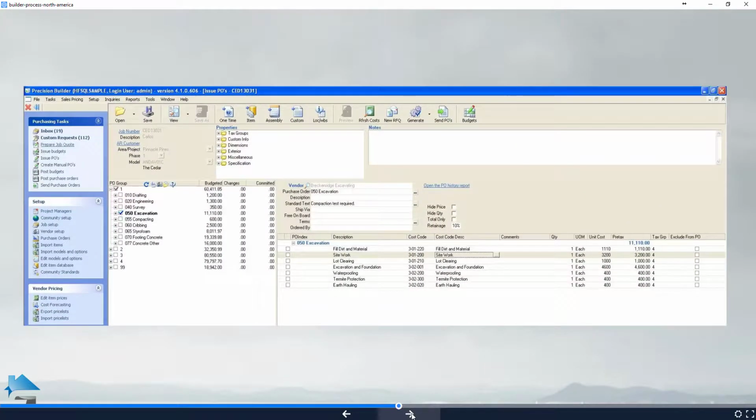purchase order creation. Depending on how you issue your POs, you may want to issue your purchase orders in stages. Maybe you have a stage release purchasing methodology where you don't issue all your POs at one time, you do them at different release points. In this particular example, we've got a multi-stage purchase order release, and we can go through and review them individually if we need to, at which point, when we're reviewing them, we can make alterations to the values, maybe reassign the work to different vendors depending on what the case may be.